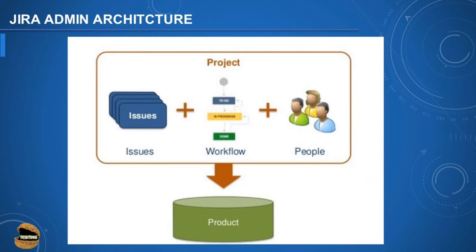For example, when creating a particular issue you might need to ensure that all the mandatory fields have been fulfilled before it is created. Similarly, in order to move a task from 'In Progress' to 'Done', a condition should be met. You specify that condition in the workflow — meaning if someone tries to move a task from 'In Progress' to 'Done', it will check that condition, and only if it is met can the task be moved.